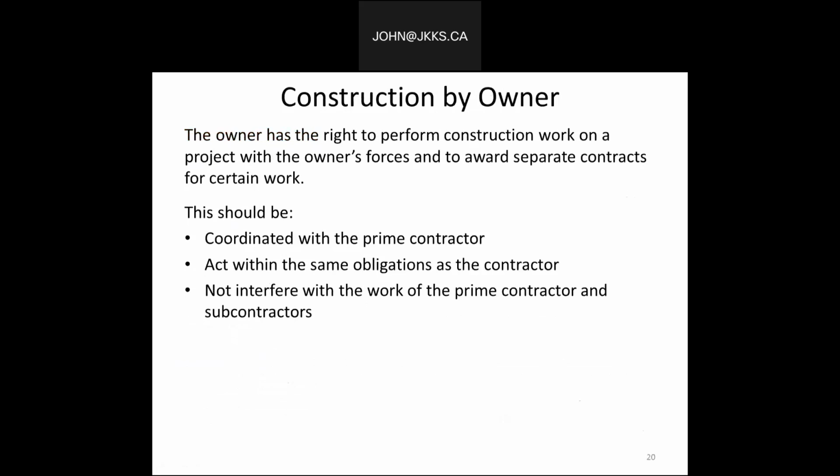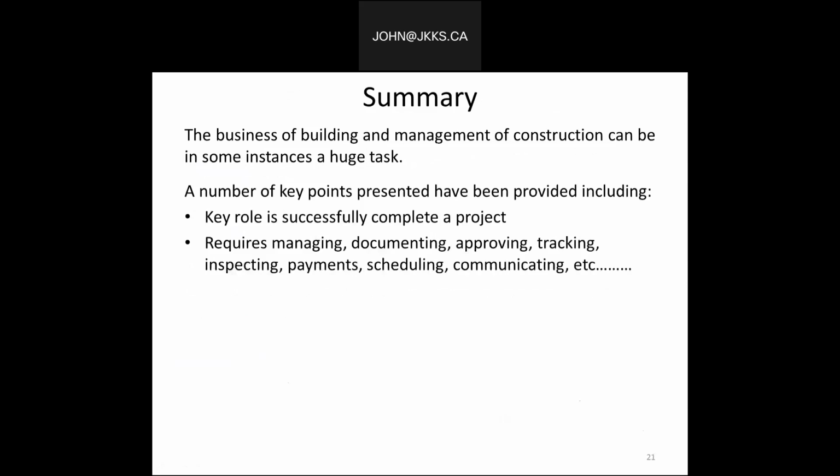Let's talk about the construction and the owner. The owner has a right to perform construction work on a project with the owner's forces and to award separate contracts for certain types of work. This should be coordinated with the prime contractor, act within the same obligations as the contractor, and not interfere with the work of the prime contractor and the subcontractors. However, problems may arise when the owner's contractor delays or damages another's work. So again, that is one of the downfalls, the potential conflict between work by the owner during the construction period at the construction site.